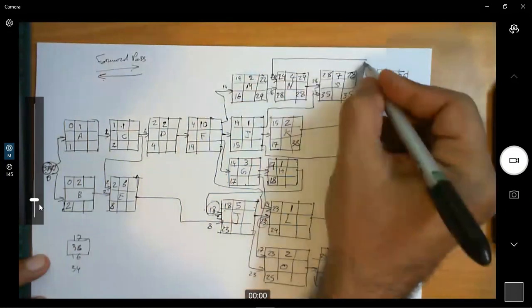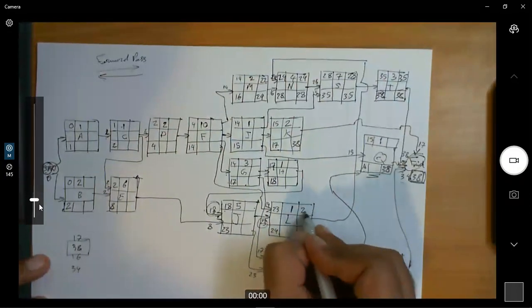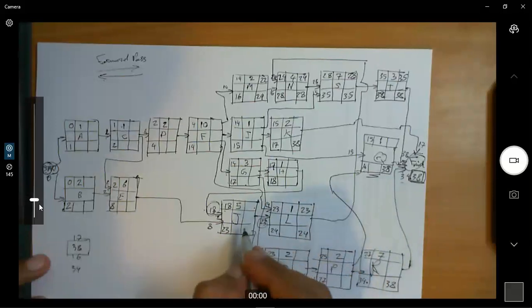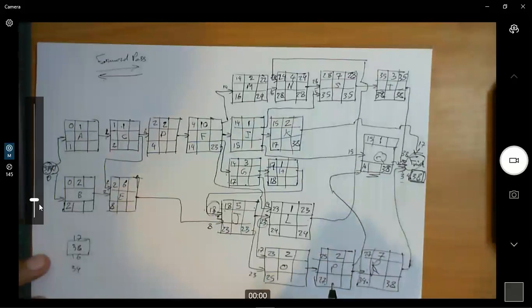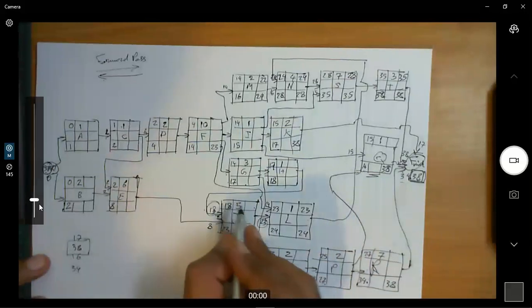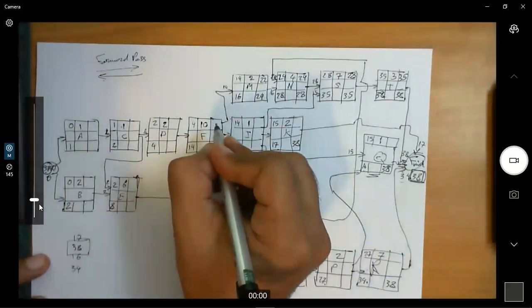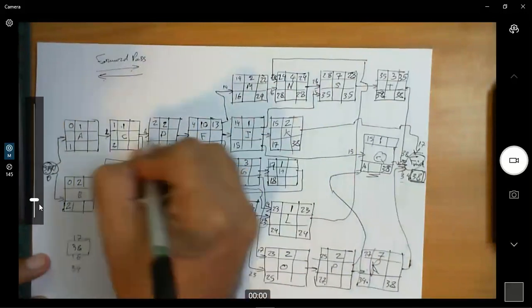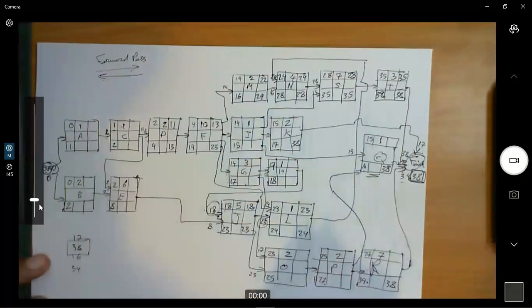We'll go back again with this line. We have 24 and here 23. Okay, we go back, follow these inputs. We have 23 here. Okay, and we have 23 here. Okay, so 23 minus 5, that's 18. 23 minus 10, that's how much? 13. So we have here 13. 13 minus 2, 11. So here it's 11.